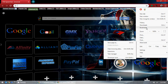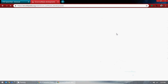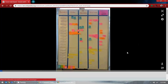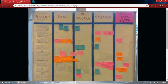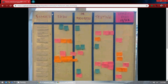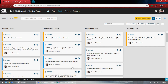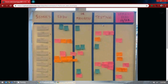The kanban board looks like this. This is a traditional board where you have user stories here. Then you have a to-do column, an in-process column, and a testing column. This is a traditional way of doing this work — you have a physical board, you put sticky notes on it. The white sticky notes are called user stories. You move them from to-do to in-progress as work begins. Development always starts first, and testing begins only after development is completed.